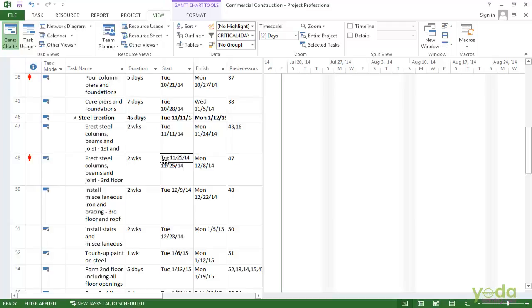Filtering is a great way to focus on just the information you want to see. You can use the built-in filters or build your own filters. If you create your own filters, the easiest approach is to copy a built-in filter that has some of the tests that you want and then add to it. It's as easy as that. I hope the concept is clear to you.